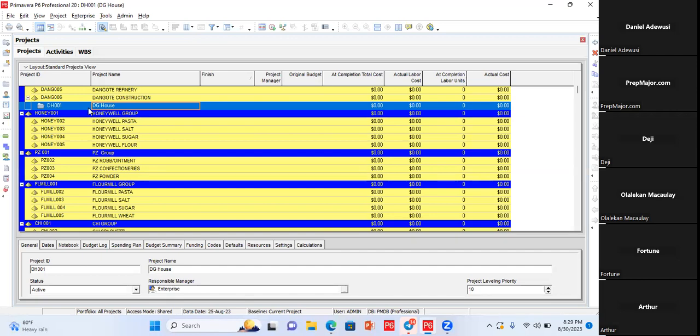So when you go to a company and they say develop a project, you need to understand their working calendar. You need to understand the holidays they take. The statutory holidays, do they observe every statutory holiday? If they observe them, you must take that into consideration. Some days are statutory holidays, and they are not working on those days.